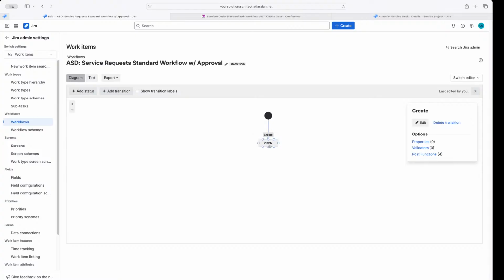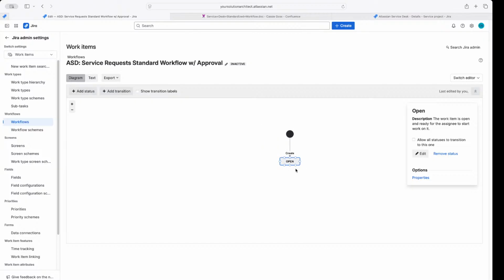So words really matter when you're talking about workflow because the transition has special properties and powers, and the status has special properties and powers, if you will. So the line is the transition, the rectangles are the statuses. And when you're looking at a status, just glancing at the status, its color even means something. So in Jira or in JSM, any of the Atlassian products with workflows like this, you will notice that any status that's kind of like a to-do, like work hasn't been done on it yet, will have a gray color.